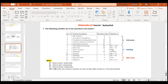The last one is SF — start to finish — which is not in our example. For instance, if a second activity has a relationship with a first activity of SF, that means the second activity will finish only when the first activity has started. This is SF, which sounds very weird, and that is why it doesn't have any practical significance in construction.